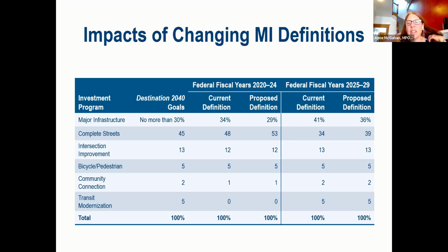Well, that's the second policy, that it doesn't necessarily have to go forward. That's where the second part was, where I said you get to actually rescore it when it comes into the TIP. And then you get to look at if there's a cost increase. You get to look if there's a lot of public input, because it may be a project that we included as part of the LRTP in the later time bands, and we didn't have this information. So it allows you to relook at the project once it's really starting to go through the design. The first 5 years of the plan is the TIP.